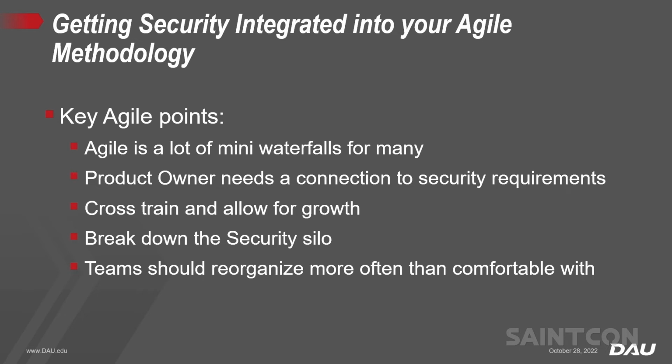And I've seen ways where we've removed silos and gotten teams for small projects where we've gotten the right expertise, both in development of software and engineering, working together, where we take complex, highly regulated projects within some of my DoD work that I've done, where it has hard rules and safety and security, and we got the requirements in early and worked with the dev teams and got cycles back into us for review, so we were able to take programs that normally take 3 years or more down to 18 months for an end-to-end project, including hardware, to be put into secure environments.